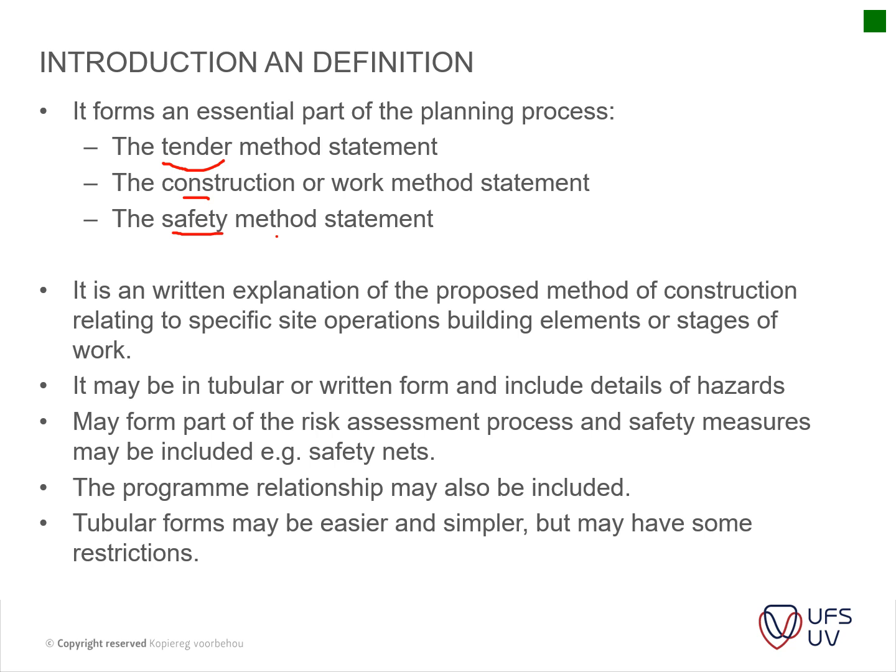Your scheduling, your program is also a method of capturing the method of execution. So usually that runs hand in hand. Your program and your method statements complement each other. It may form part of a risk assessment process and safety measures, and it may include things like safety nets that you need to think of when working at heights. The program relation may also be included.